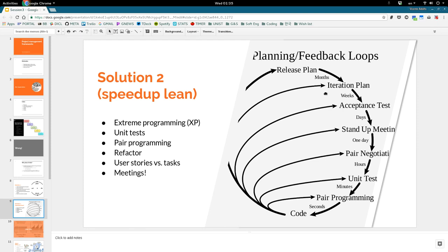Normally they are time-boxed. What I mean is they are mostly always the same time span. So maybe for the first release, we release every 2 months, but we have 2-week iterations. So we get 4 iterations overall. And then after we have this iteration plan, 4 iterations in our case, let's say, we make some documents where we say, okay, we make sure that the iteration is successful if we satisfy these little requirements, which is the acceptance test.